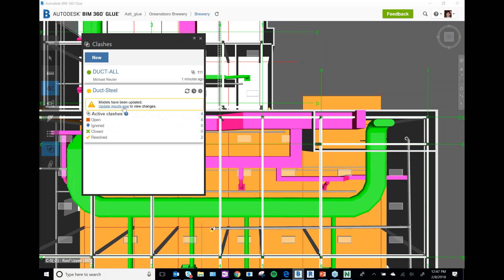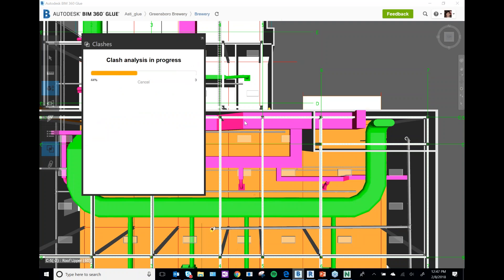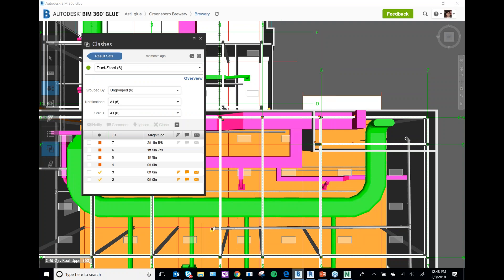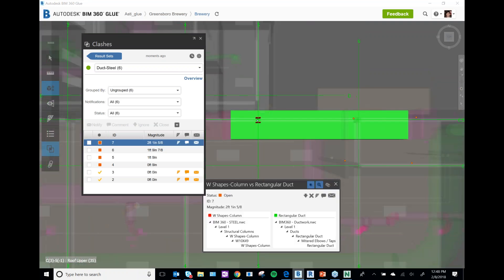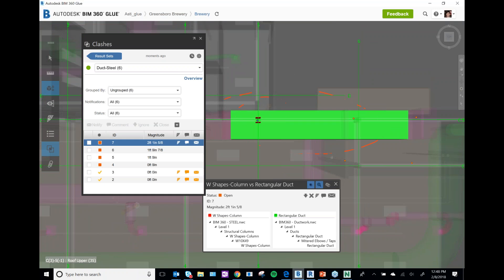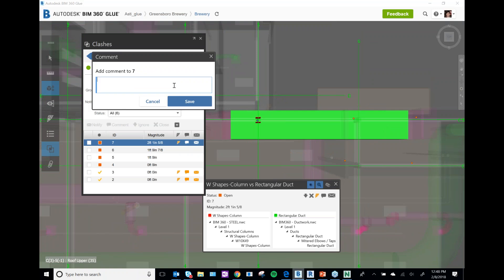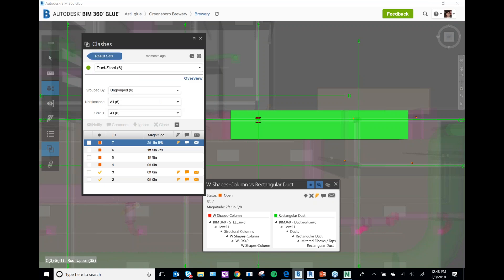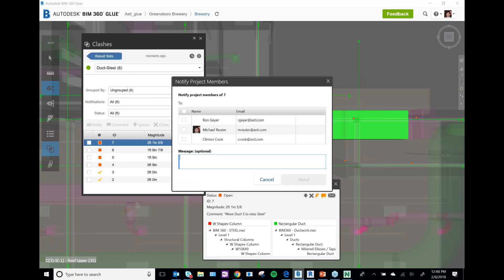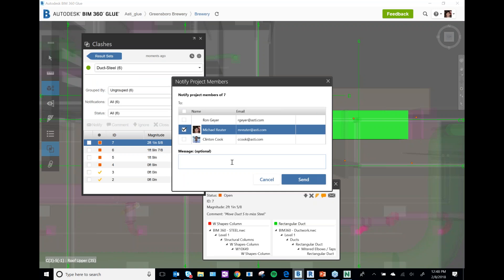I'm going to take a look at my duct-to-steel clashes. We can already see there's a pretty major one with this piece of ductwork. I'm going to select this one, mark it up just like I would in Navisworks or regular Glue, make the comment 'move duct south,' and then notify myself of the issue.